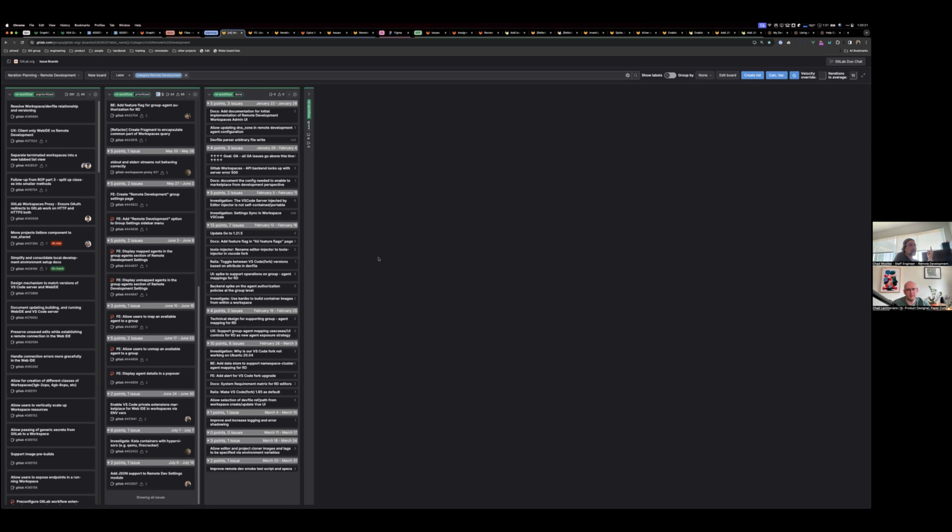This is the way XP, the first agile methodology, works. And modern Scrum no longer has the concept of committing to things in the current iteration. It explicitly talks about measuring your past velocity and using that to determine how much you can get done, which is the same as traditional XP.